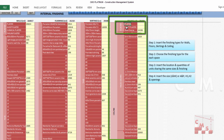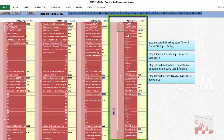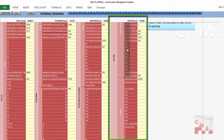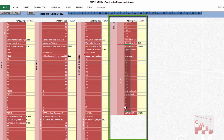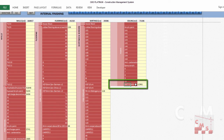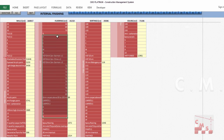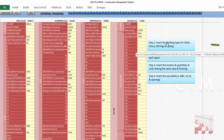For the ceiling, it must have a background — either plaster, shoot plaster by machine, or direct base course paint on the slab bottom. First you add the background, then the false ceiling types according to your project specification, then all the required paints. Note: the last type of paint is anti-fungus — don't change this. For floors there is a fair face option — also don't change that. Insert everything according to your project specification.